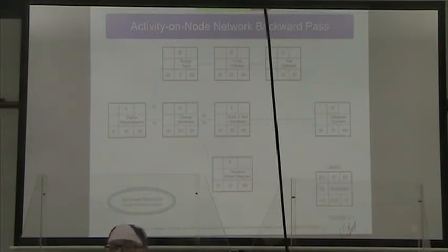We subtract the duration to get our late start time. Now that time propagates backwards to all of these activities that merge into our H activity.